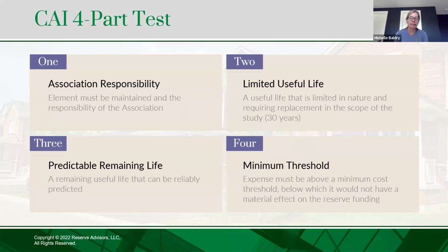And it really is a great idea to get the reserve study done right away so that you can get the dues on track initially. And even if you do have to gradually work up to fully fund the reserve account, at least you have a plan. So as you're presenting these initial budgets that are prepared by the association now instead of the developer, you can outline the plan to the homeowners of, we might be underfunded right now, but these are all of the components that we're responsible for. These are the needs of the community. And this is ideally what we need to fund to this account to avoid special assessments. So it is a good idea to do it sooner than later. Otherwise, you end up playing catch up.